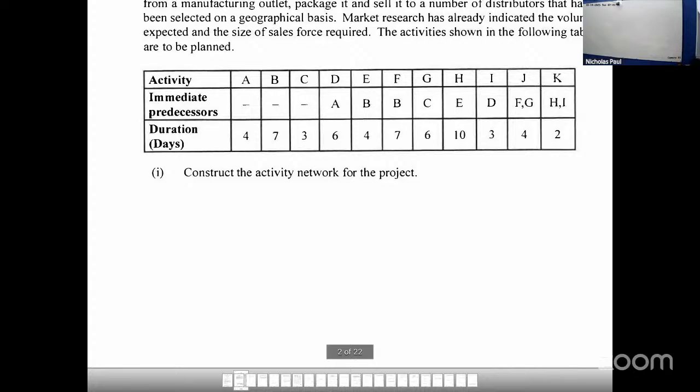All right. So let's say we have this activity here. Obviously, the activity has to start. But the only way you could do, for example, a chi-squared in your project is if you have your data. Right? You cannot start that until you have your data. So if your data takes you 5 days to get, you have to wait 5 days before you start to analyze it. Okay? So I want you to understand what's going on here. We have to have an idea how long it takes for certain things to happen.